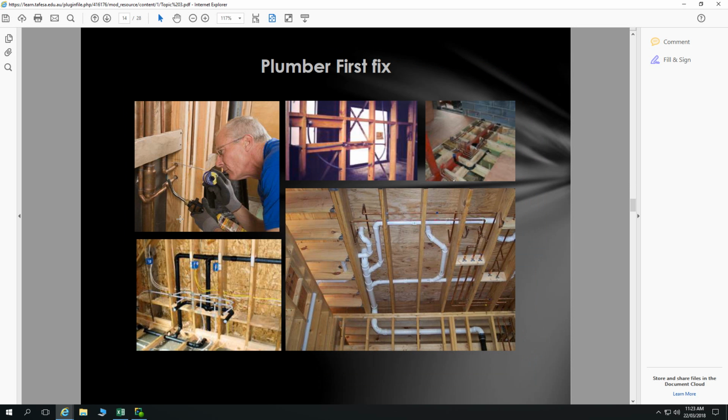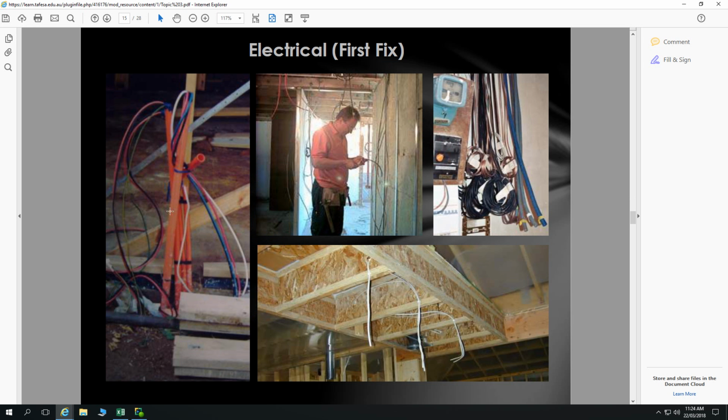And then our plumbing first fix. Well, I called that our initial sanitary plumbing first fix. It's not exactly the second fix plumbing, but it's the first fix through the framing. So we get our plumbers in there. Now that can also happen, so we've got a plumber's first fix and electrical. That can happen consecutively. They're both doing the same type of thing, but it's not a really busy site. It may be the one person and possibly an apprentice on site for each of those trades.